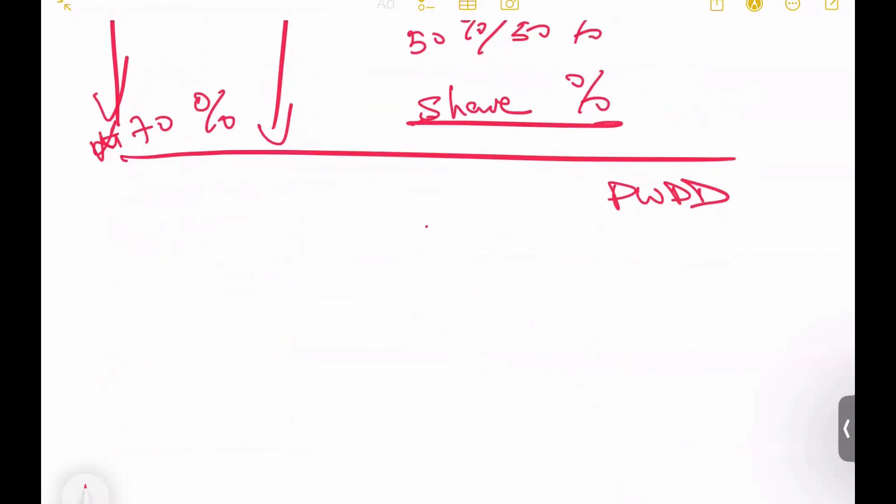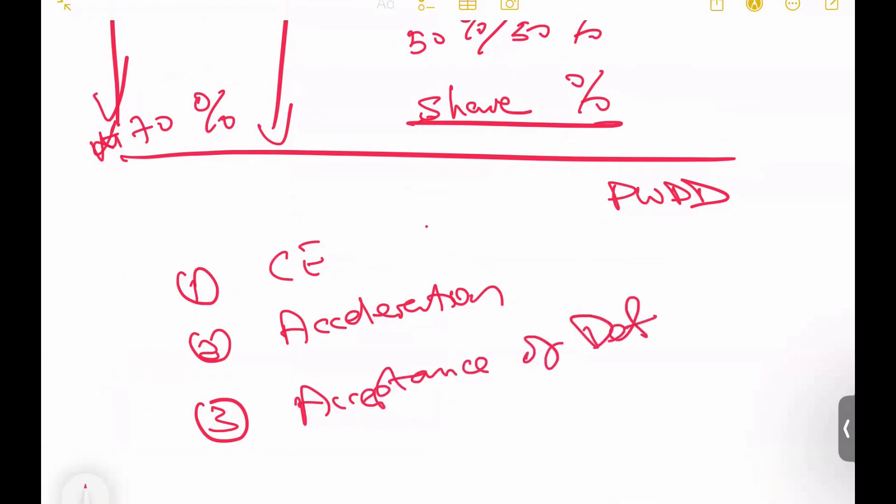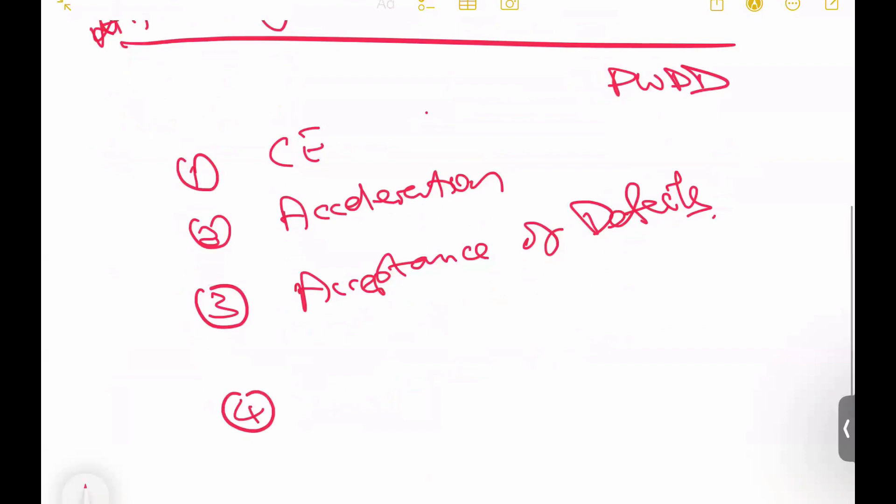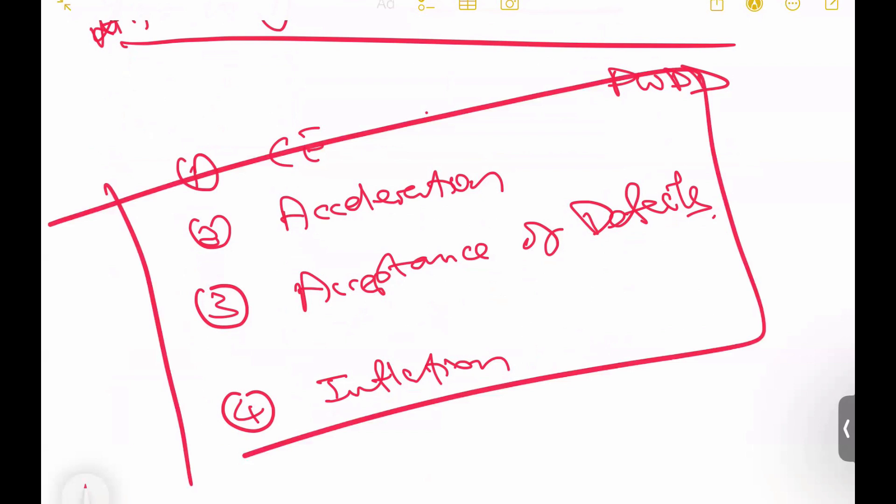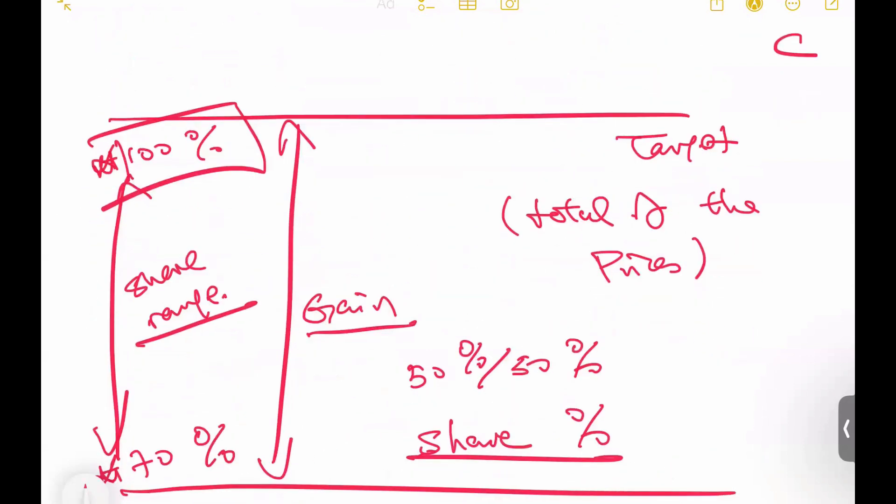By the way, the target, the total of the prices, can be moved by a number of things. There are three, potentially four. First one, compensation events. Second one, acceleration. Third one, acceptance of defects. The fourth one, we cannot control - inflation. Due to these four factors, the target will change. The total of the prices will change. Therefore, we need to express the share range as a percentage instead of some absolute number. That is the reason why.